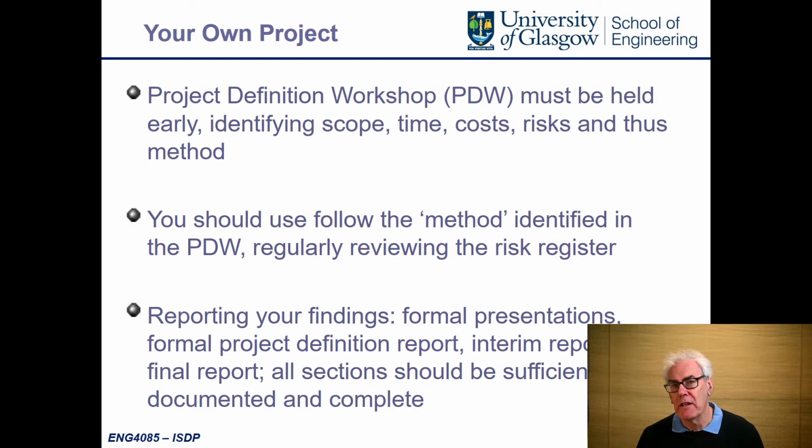For your own projects, I would encourage you to do your project definition workshop up front and early. Get your team together on Zoom and try to work out the scope. Focus on the scope at the starting point and then worry about tying costs and risks, because you need to be clear on what you're delivering and make sure everyone in the project team understands what the aspects of the scope are.